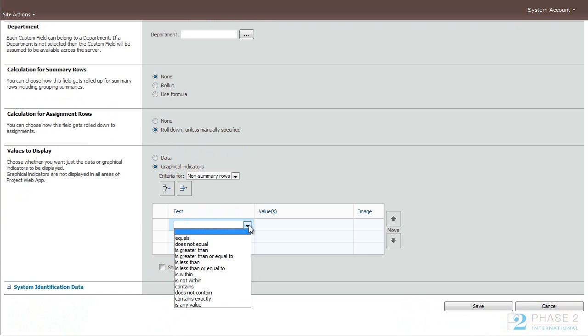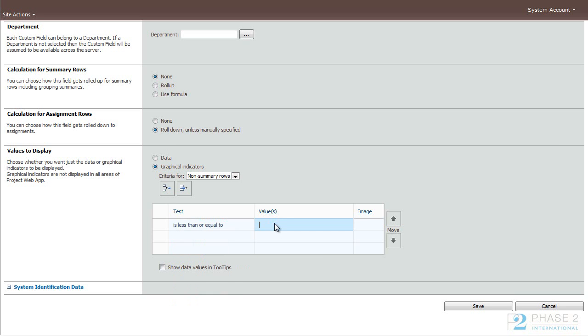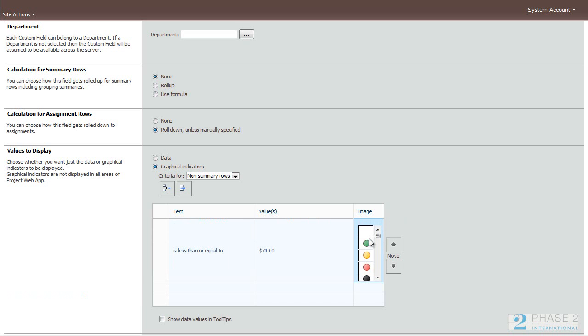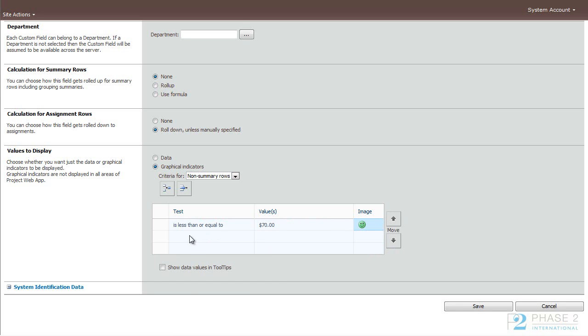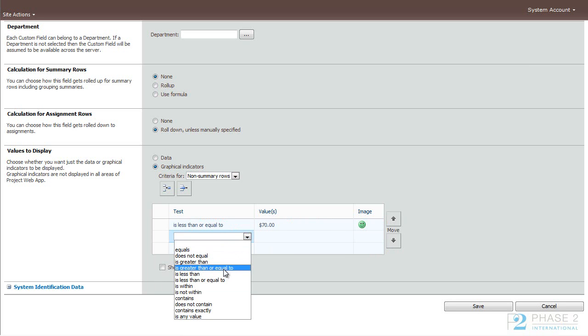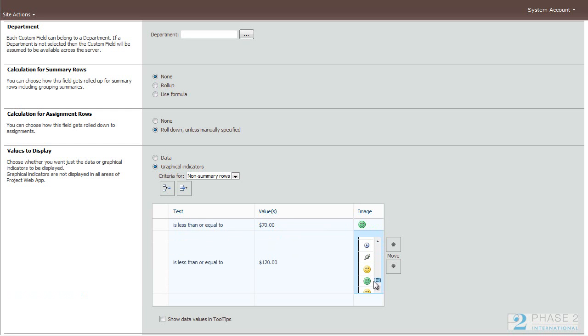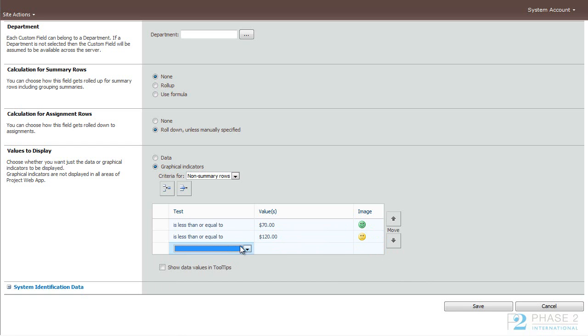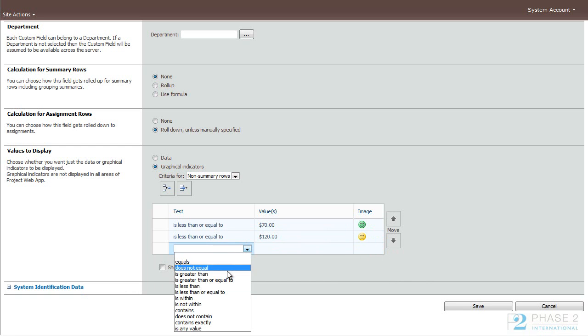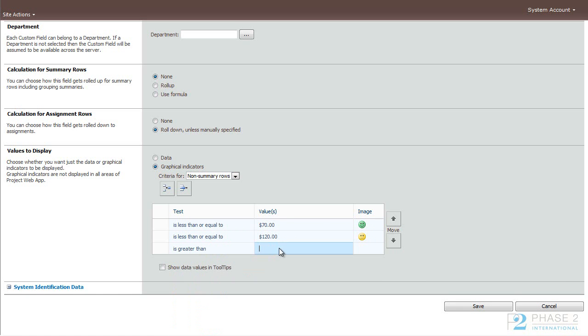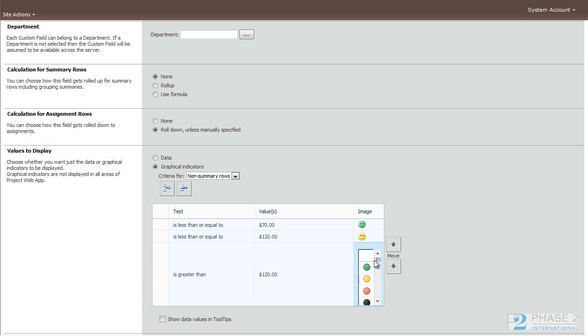Roll down and we'll change this to graphic indicators. And we'll choose less than or equal to $70. Let's use happy faces. If less than or equal to $120, it will be in the yellow. And finally, if it is greater than $120, it will be in the red.